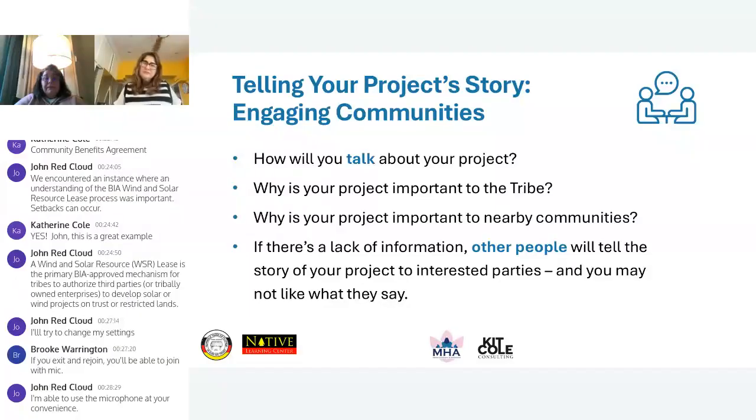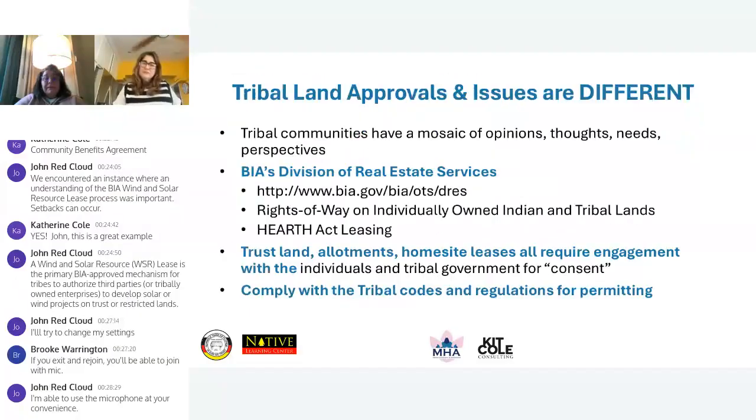So we came across, we knew nothing about this BIA wind and solar resource lease, this whole packet and process and its code of federal regulations. And oh my goodness, it was a lot of stuff. So once we ran into it, we then realized we had to be very particular and make that expectation clear with the participants, because our program is a grant. So we're just going to kind of roll it out. And we're looking at these Lakota households. And if you are on lease land, whether it's going to be a mobile home or a site built, then we have to undergo this process.